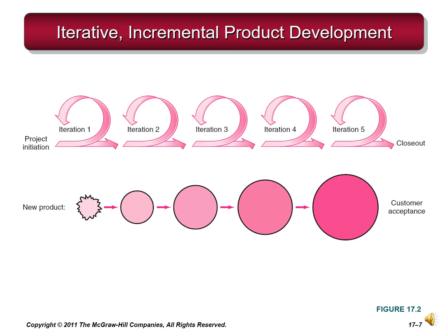Just to review again, the goal of each iteration is to develop a workable product that satisfies one or more desired product features to demonstrate to the customer and other key stakeholders. At the end of each iteration, as you can see from this diagram, stakeholders and customers will review the progress and reevaluate priorities. Adjustments are made and a different iterative cycle begins. As you can see here, each new iteration of work is predicated by the previous iteration and adds new capabilities to the evolving product, or you can see kind of the snowball effect in the bottom part.